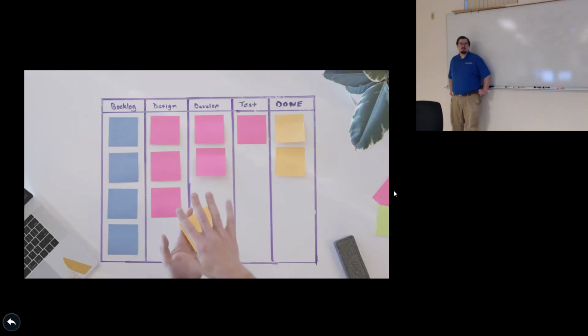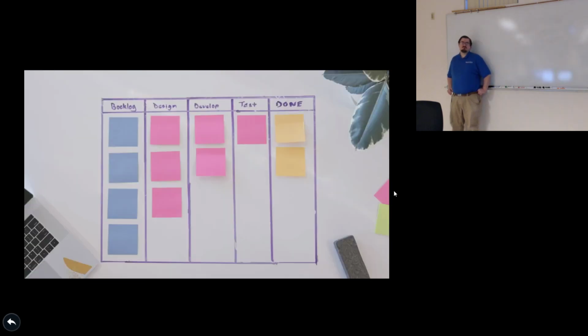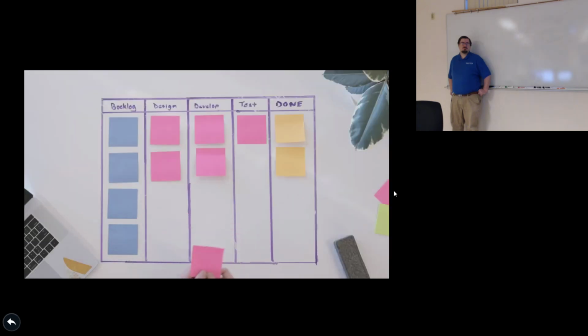Imagine a colored index card in the bottom of a bucket of bolts. As the bolts would start to be used, the index card would start to reveal itself. When it was fully revealed, it was time to order new bolts. These Kanban cards formed the basis of the Toyota manufacturing system and informed how we use them today in Kanban work management. Uses of these cards rapidly evolved into this artifact that would follow a work item through the factory through different stages of completion. This story and this notion of an artifact following your work through stages of completion is what influences how we deal with Kanban cards today.